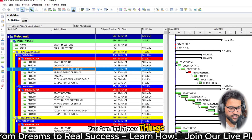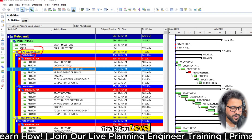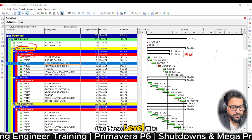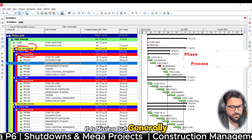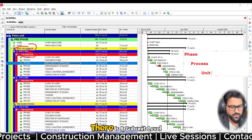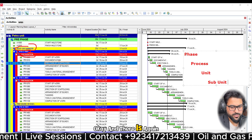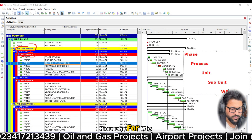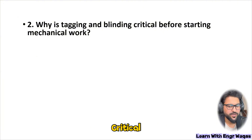In Primavera P6, within the activities window, you can find these levels: equipment level, tag level, and work package level. Generally, the full WBS hierarchy is: phase level, then process level, then unit level, then subunit level, and finally cost center or work package level.